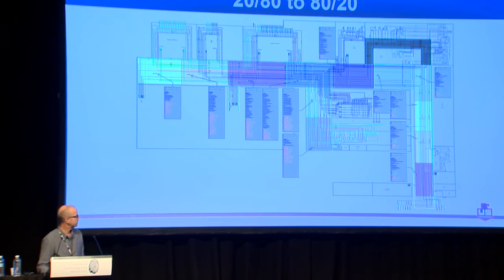And the utilities exist down here. My point in showing this is that we actually had to have the architect change the building design to accommodate this approach. So if you wait until the building is designed and now you're involved trying to figure out how much you're going to fabricate, you aren't going to take advantage of it to the greatest extent.